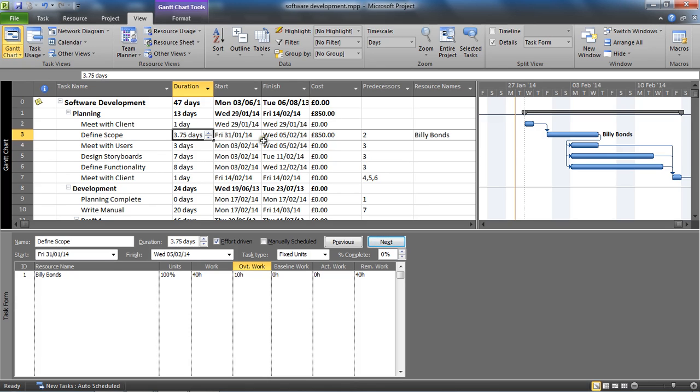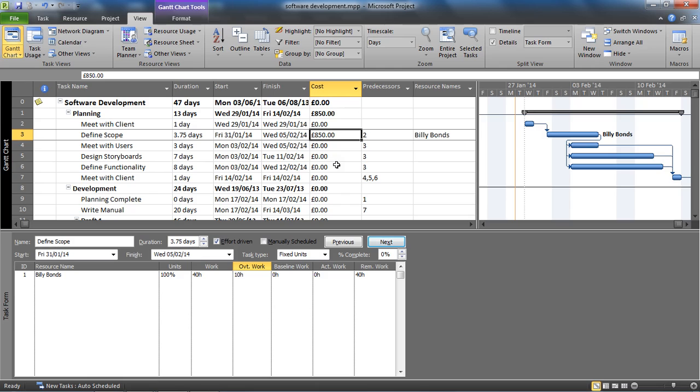It's costed at 850 pounds. He's doing 30 hours of scheduled work at 20 pounds an hour, that's 600 pounds. 10 hours overtime at 25 pounds an hour, that's 250 pounds. 600 plus 250, we have 850.